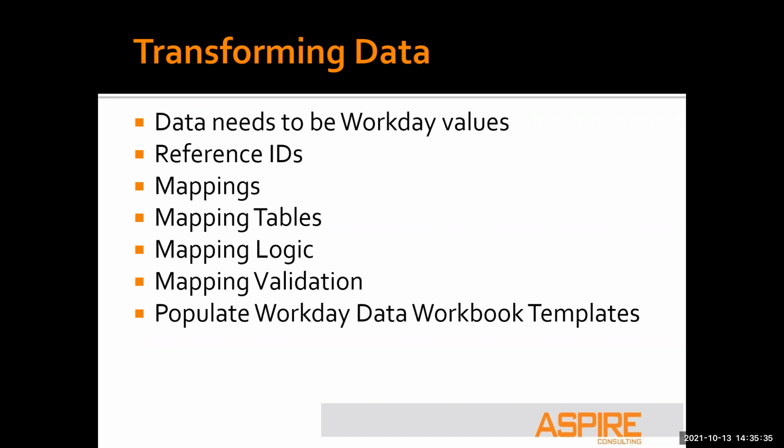If you have 5,000 active employees, but you've been around for a while and you have 15,000 old terminated employees, from a monetary point of view, it may not be worth converting them. If your license isn't set up that way, if you're unlimited, there is no reason not to do it, other than it's just more data for you to have to deal with in your conversion, right?